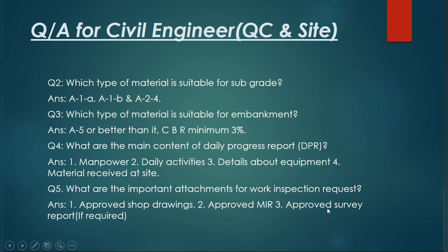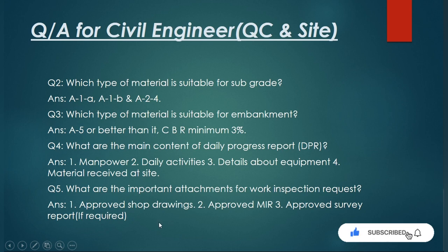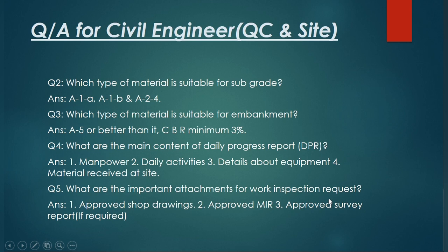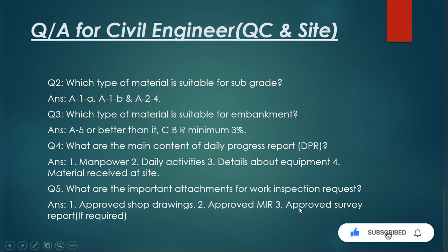The third attachment is an approved survey report, if required. For some activities, such as checking the location of steel reinforcement or floor levels, you need to attach the approved survey report. For example, if you are submitting a WIR for casting concrete, you need to attach the approved survey report.